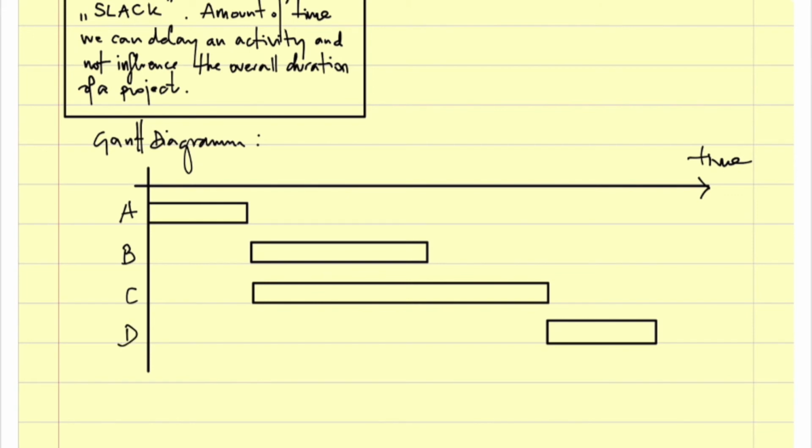And the dependencies are like this. I cannot start B and C without being done with A. I start B and C at the same time.